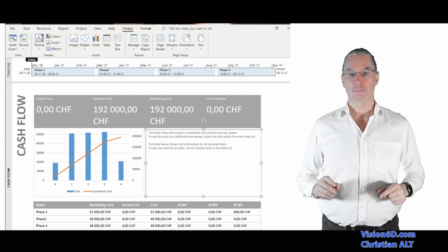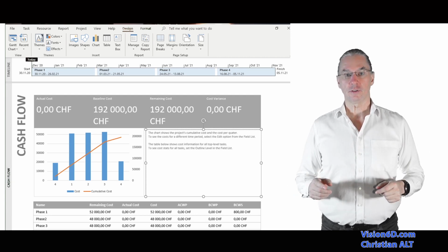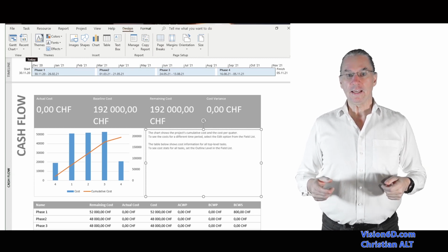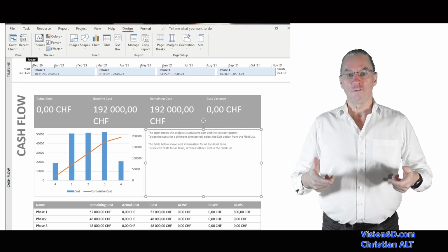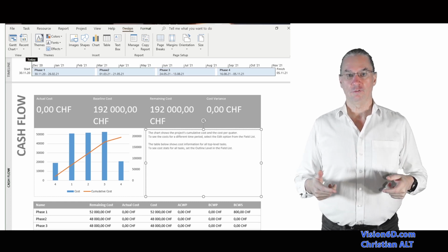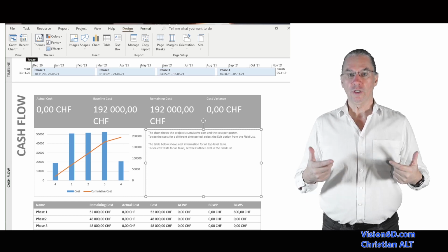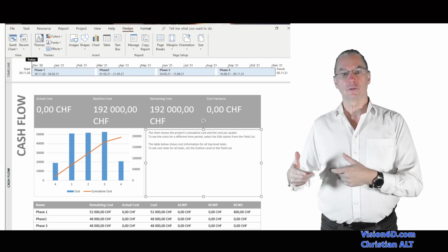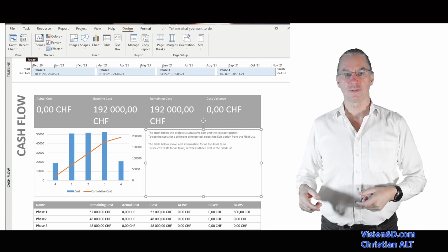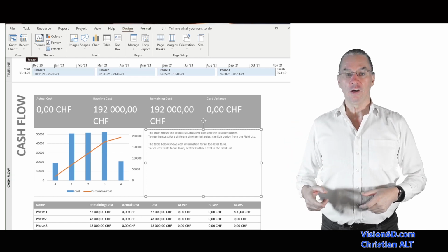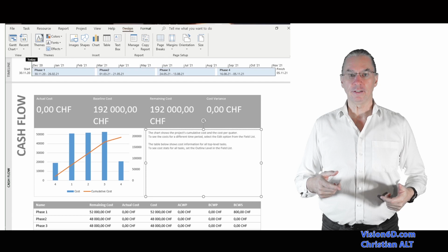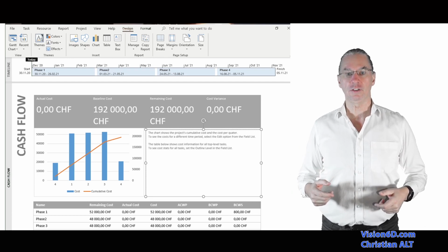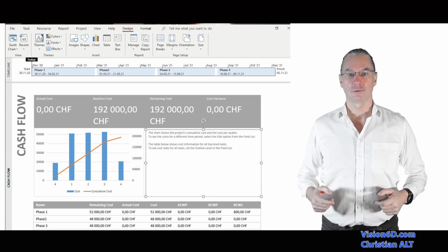There is another situation, that maybe the funding of the project cannot be done as fast as we would request it. For example, first quarter we can finance up to 250,000 and the second quarter we will be able to finance up to 500,000. For those reasons, the baseline has also to adapt to the financing possibility of the organization.